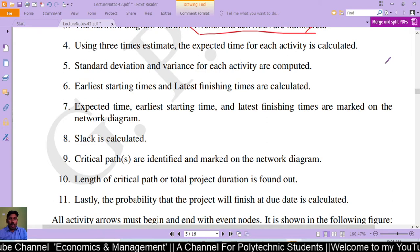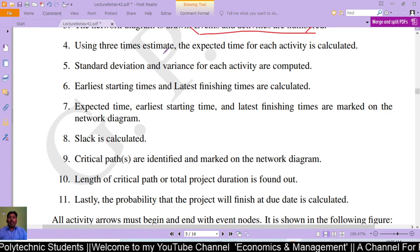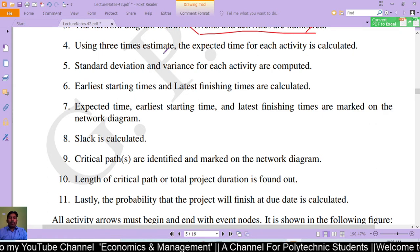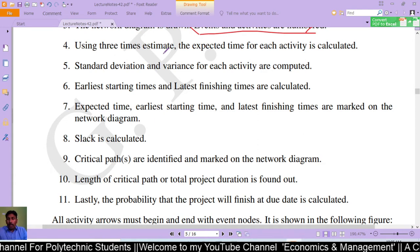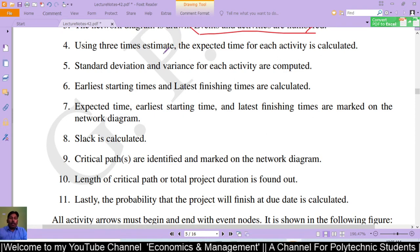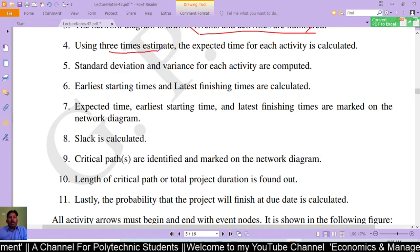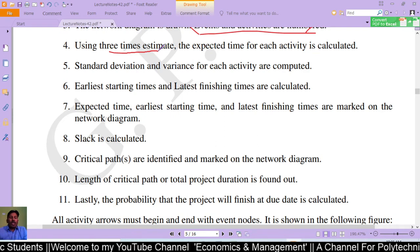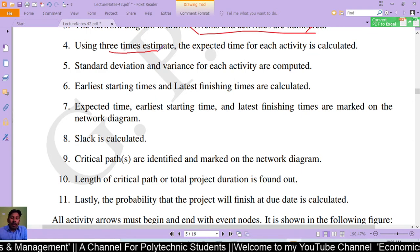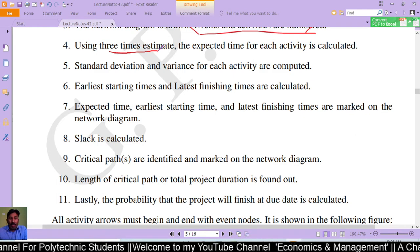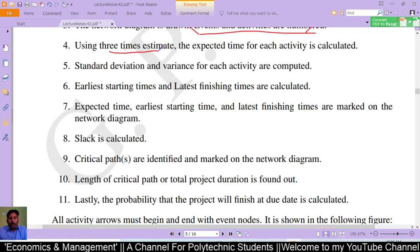In PERT planning, the expected time for each activity is calculated. The three-times estimate technique is used in management and information system applications for the construction of an approximate probability distribution representing the outcome of a further event based on very limited information — meaning you are not certain about what may happen.